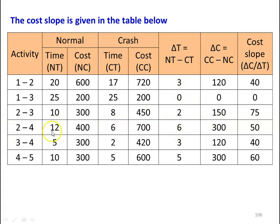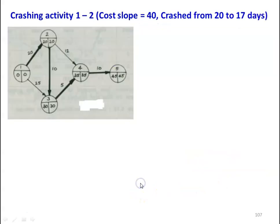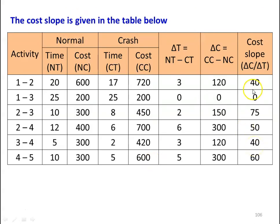For activity 2-4: delta T = 12 minus 6 = 6, delta C = 700 minus 400 = 300, cost slope = 300 divided by 6 = 50. For activity 3-4: delta T = 5 minus 2 = 3, cost slope = 40. For activity 4-5: delta T = 10 minus 5 = 5, delta C = 600 minus 300 = 300, cost slope = 300 divided by 5 = 60. Ranking by lowest cost slope: 1-2 and 3-4 (slope 40), 2-4 (slope 50), 4-5 (slope 60), 2-3 (slope 75). We take them one by one.